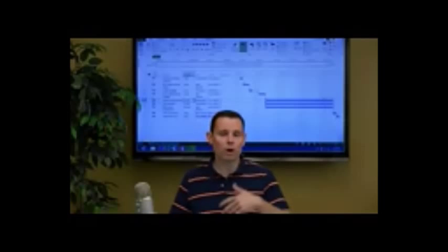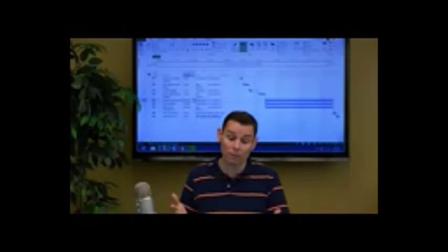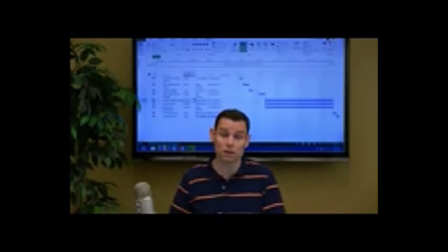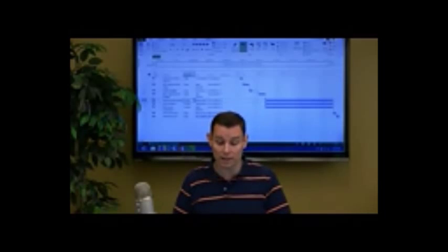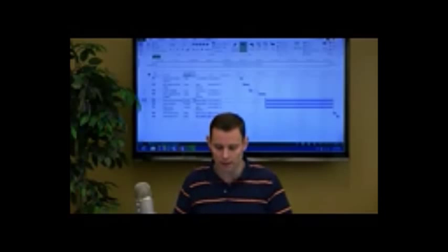And you notice here we've got this rent an event space is 15 days. Well, if you actually counted these out, it wouldn't count the 15 days towards these gray days, these Saturdays and Sundays. So you've got 5, 10, 11, 12, 13, 14, 15 working days, just like it says over here, even though it spans, what's 15 plus 9, 24 days, right? So Project allows for that. That's a very simple example of how the Project scheduling engine works. There's far more advanced things it does, but that's one basic idea.